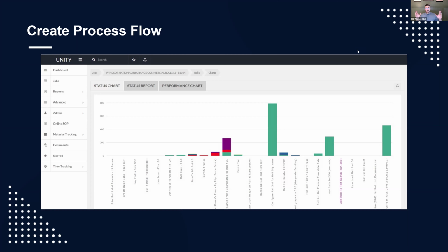Basically, there were images and it was roll scanning, and there was some green bar on there, or some strip charts. So the project called for us just saying one image per frame. So you get PDFs, and each page is going to be one little image. But these rolls had, imagine if you had 10 8.5 by 11 pages stitched together, literally connected because it's that green bar paper. Well, that affected how we framed the images. And then there was something else too, like some were really, really dark, or they were reverse polarity or something like that. But my project manager brought that up to me.